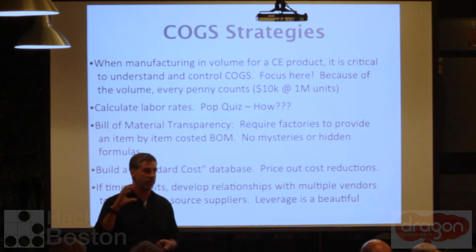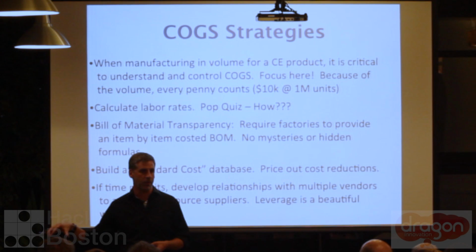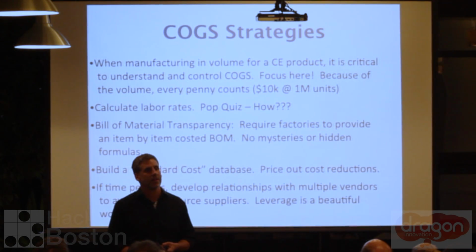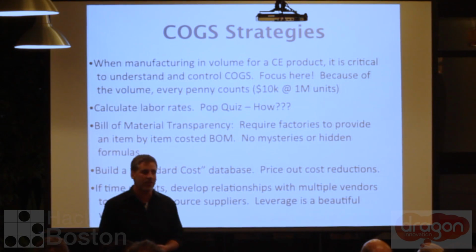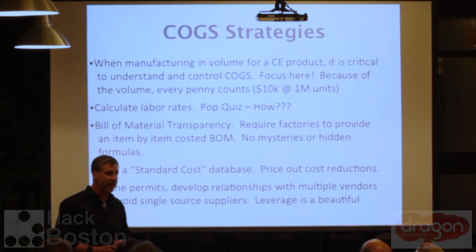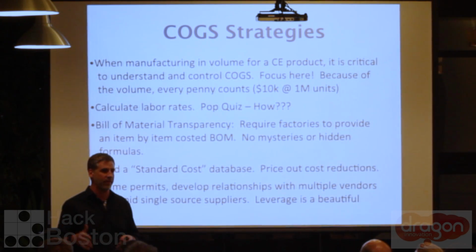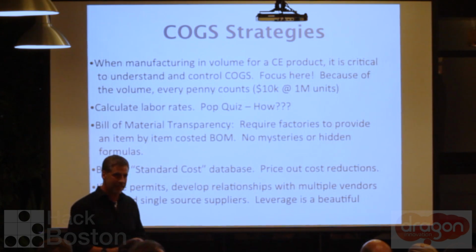The other way to do it is you could source, say, plastic parts in China and ship them over here and put them together in the US. No, I mean like the literal blister pack and cardboard and so forth that hangs on a package. Yes. Yep, they should do all that. And typically you'd go in, we call that the gift box, and then that would go in a master carton. And that way they have ownership of it. So you would do a final inspection of the product after it's been assembled and then sign off that it's okay, that you accept it or you reject it.